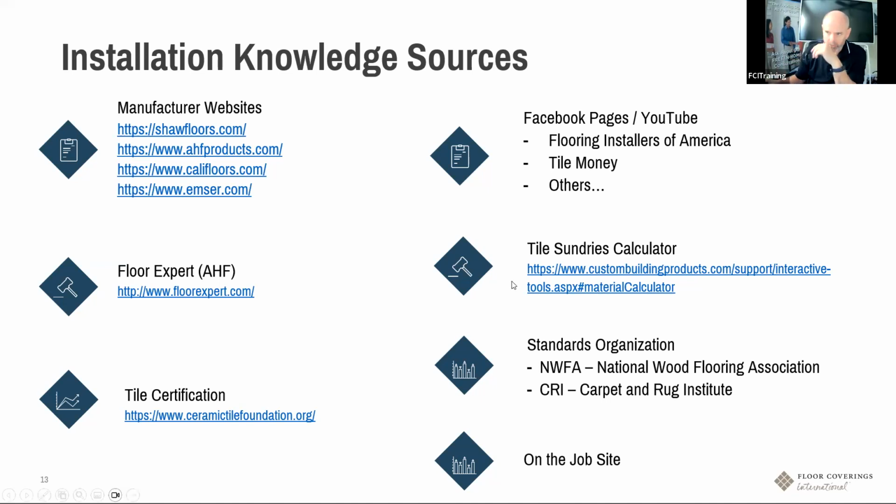Tile sundries calculator. So how do I know how much grout to order? Well, if you go to Custom Building Products, they have an interactive material calculator. So how do I know how much grout to bring? How do I know how much thinset to bring? This is a really, really cool calculator. So that's available to you.